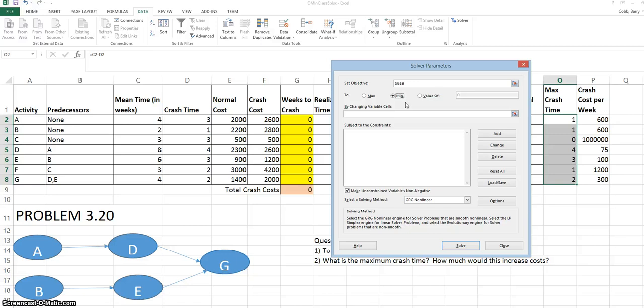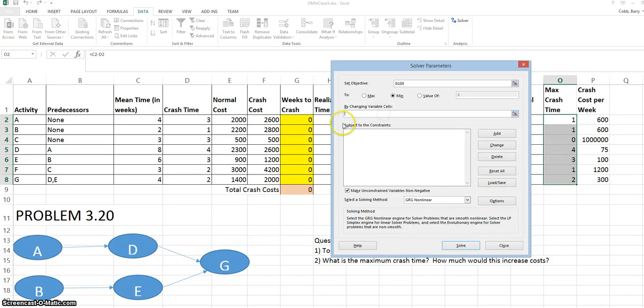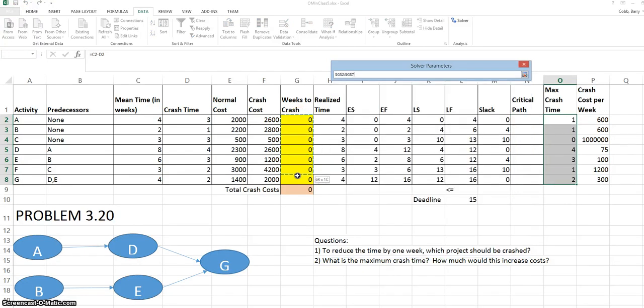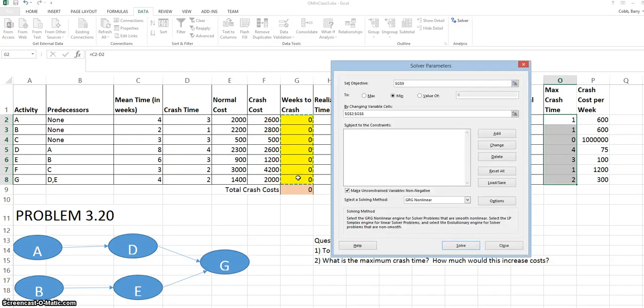The changing variable cells, or decision variables, are the values that are under the control of the manager. And in this problem, that is the weeks to crash. So we place the cursor in that box and highlight the decision variable cells, which are the weeks to crash.